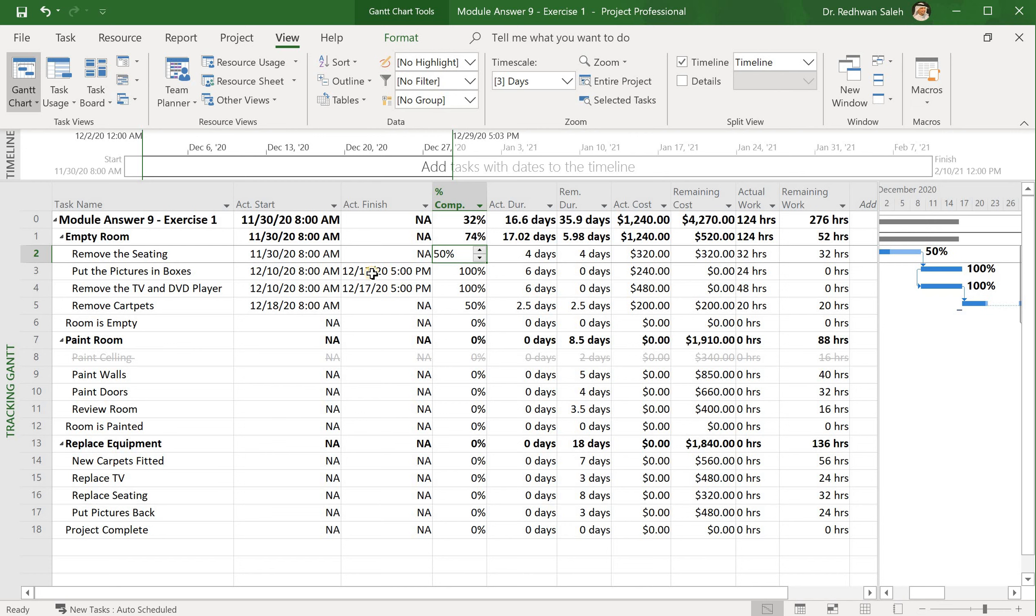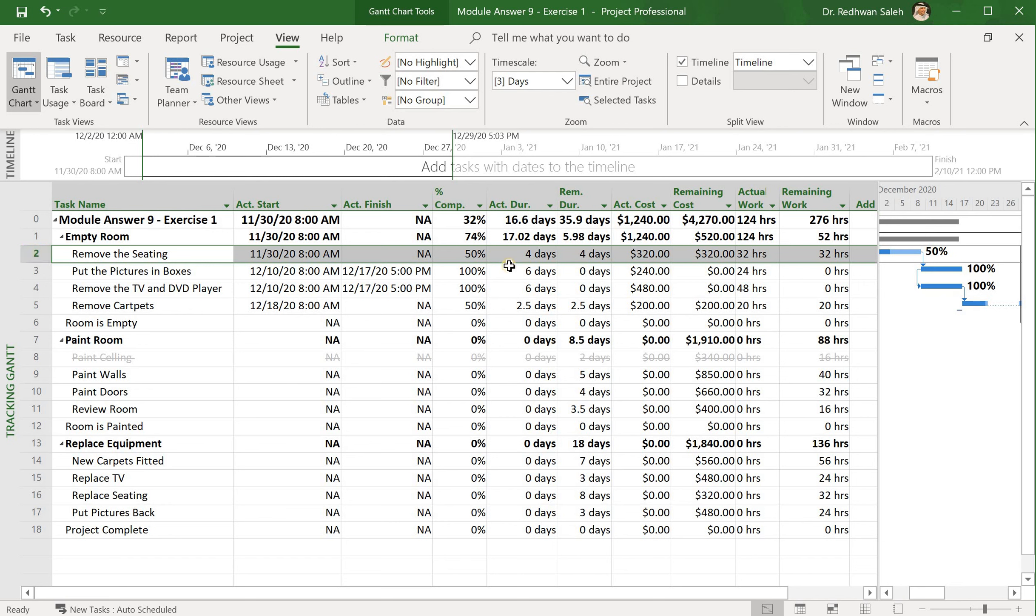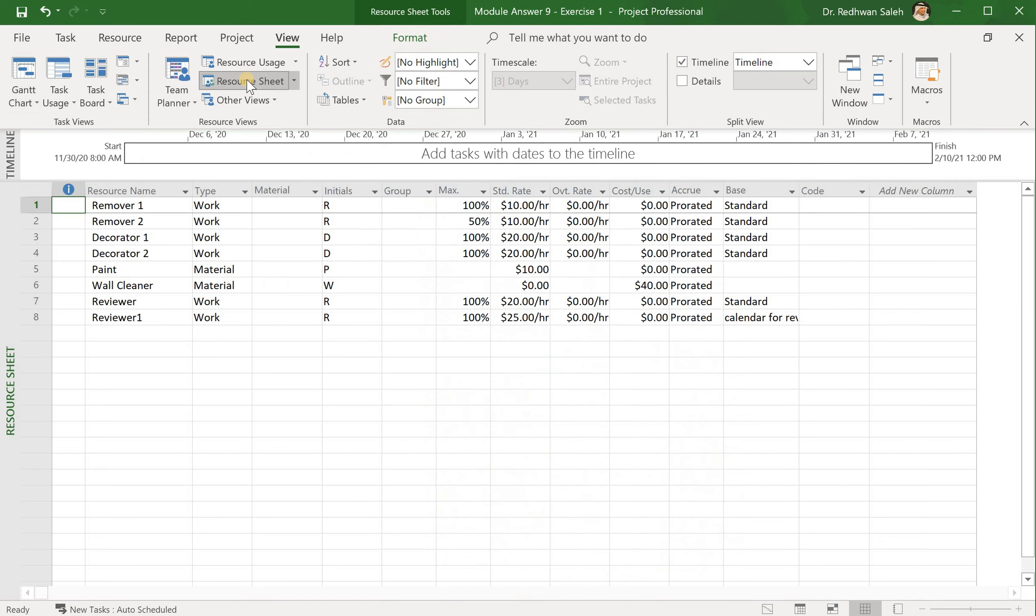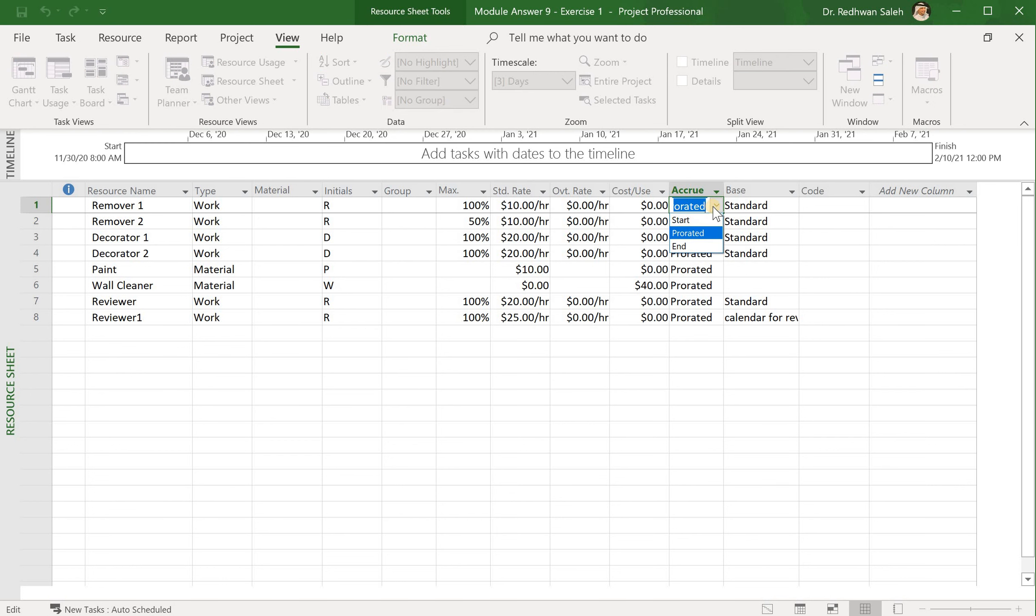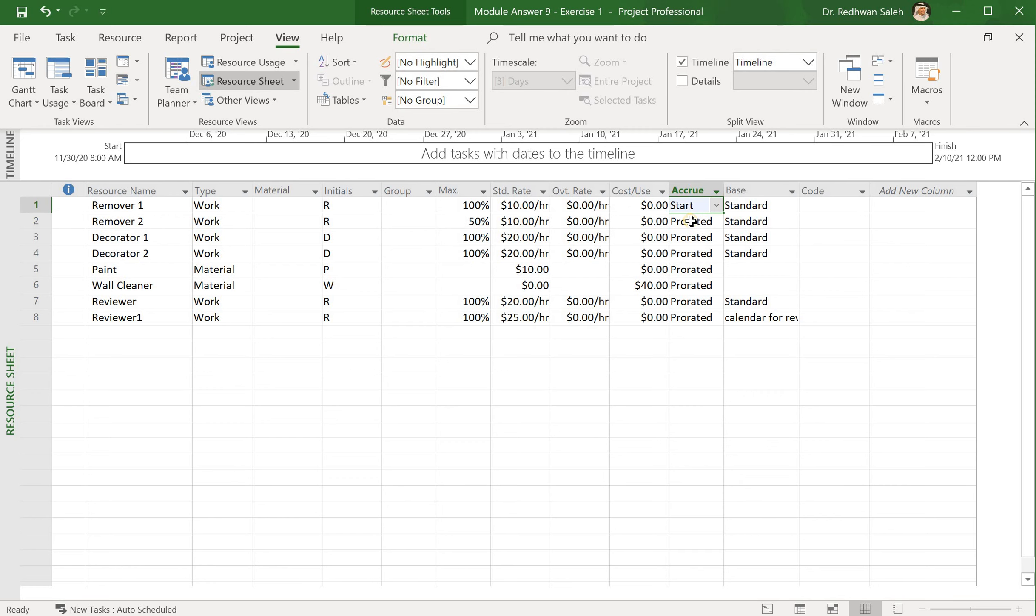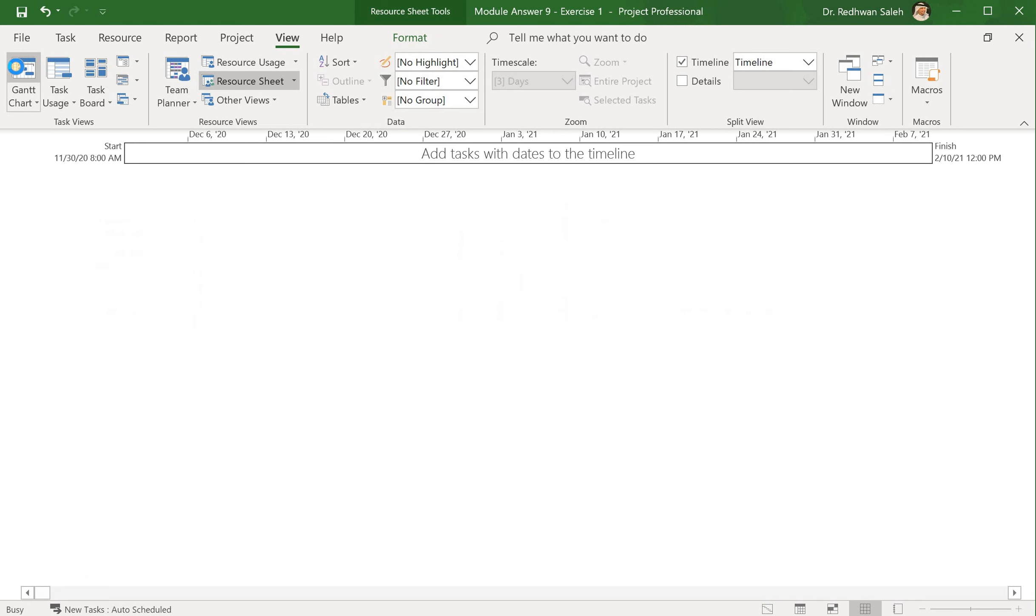If I want this assignment number two to accrue to the start of the task, I go to the resources sheet, go to Resource 1, and want this one instead of prorated cost to give it at the start. So this will accrue to the task at the beginning of the task, and I go back.